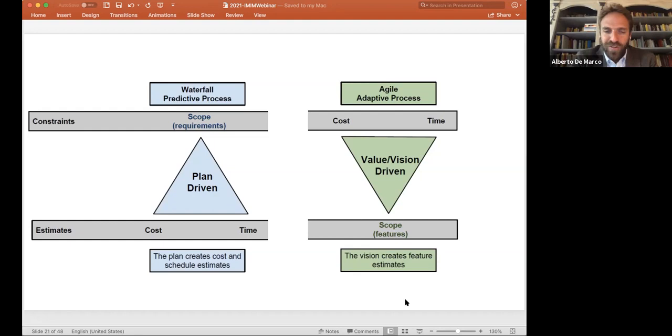Everything is predicted. So typically we tend to create a plan and try to stick with that plan. And if things don't go as planned, we get really frustrated, right? Oh, we made a plan and now the plan has not been followed. And we try to bring the project back to the original plan by spending more money, adjusting performance, hiring more people, or negotiating conditions with suppliers, so that the project is as close as possible to the original budget and time expectations.